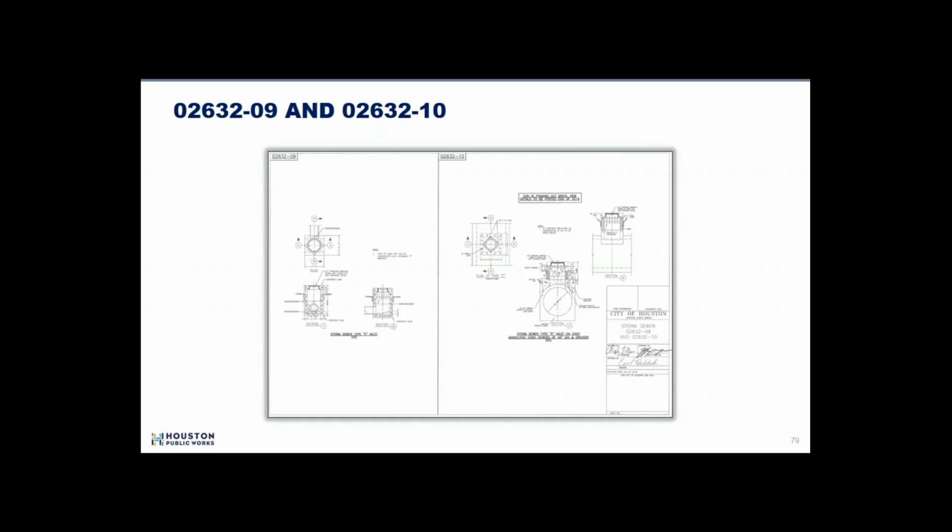In Chapter 9, we're speaking to the designer needing to take ownership of the structural design. We did get a lot of commentary, and I did ask, and we didn't have time to vet in Chapter 9 the design requirements and the calculations that a designer needs to perform and submit to the city. We do have in the professional service contract now that one of the deliverables is QA/QC calculations for whatever the component is. That is something that we are paying for, that you should already be doing and delivering to us for that sort of documentation.